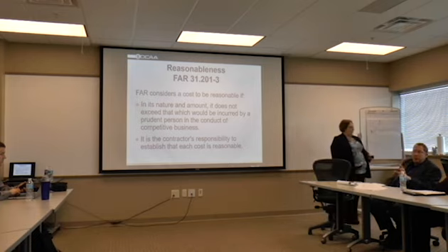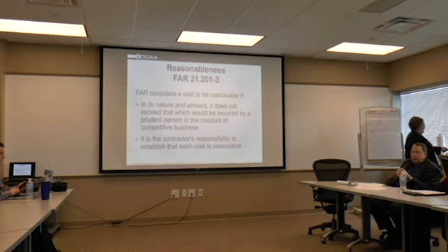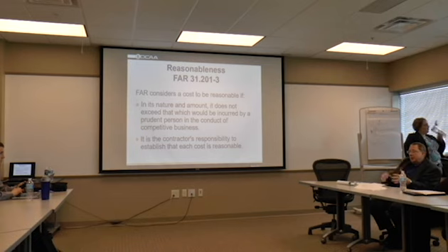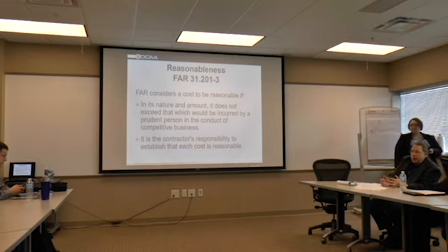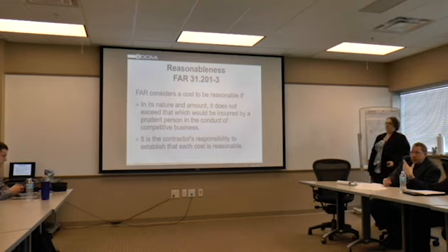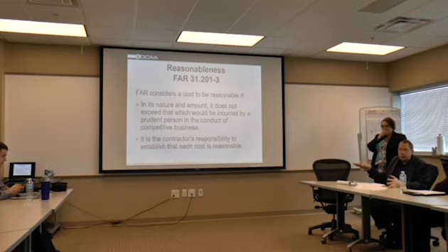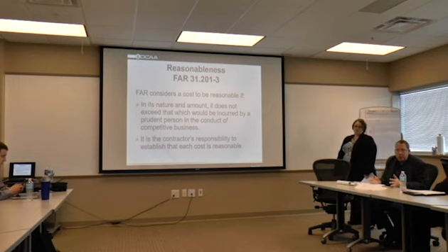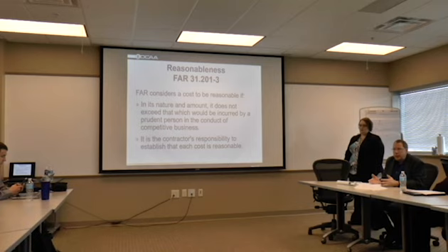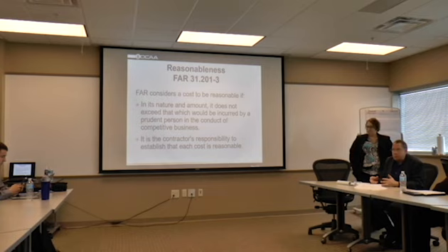Are you able to tell me what type of contract it was? Because there are cost-plus. Okay, cost-plus, but were the product or service being acquired covered by Department of Labor wages, such that there's a wage determination that exists? And so there is a defined base wage that all the bidders are going to put in that contract and apply. Whenever the wage determination changes, generally there's a contract clause that says because of that change in the wage rates, we then have an equitable adjustment, and the contract is modded to account for the escalation as it has changed.